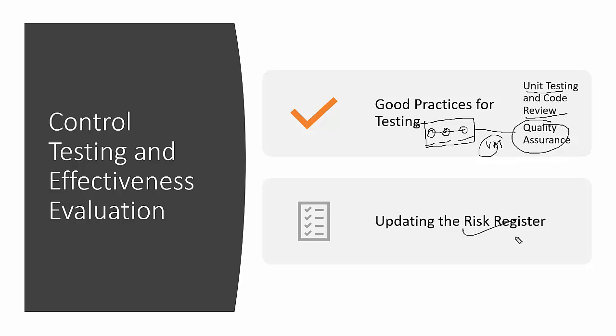So the risk register should show the progress of testing and attainment of milestones during the progress of each mitigation project. By keeping the risk register accurate and up to date, the risk practitioner or risk manager ensures that it is consistently available as a resource for risk management activity across the organization. So make sure you use the risk register in parallel in all phases.